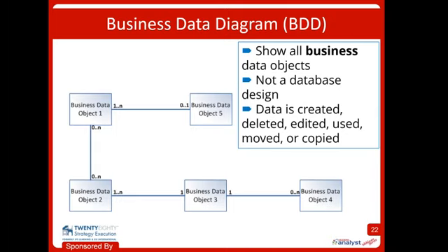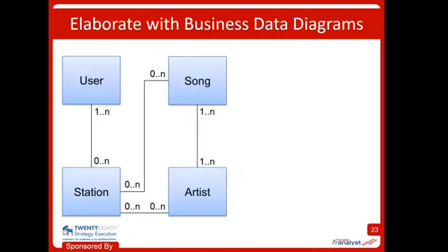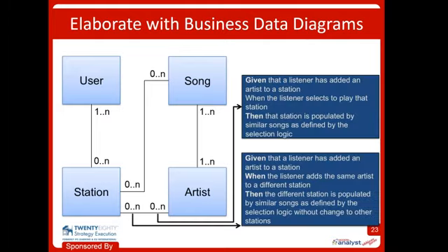Those 6 actions are the only things that can ever happen to data in any system. So if you ask those 6 verbs about every single one of your data objects, you will actually uncover all of the different stories that you think you need to be thinking about.